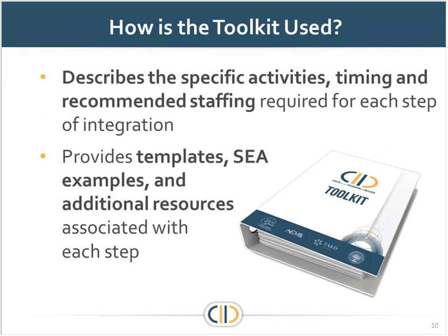So how is the toolkit used? Number one, we create specific activities within each major component, which we'll go through briefly as examples for how to complete a major step or a task within the step related to data integration, as well as providing estimates on how long it may take you and your colleagues to complete this activity or task, and who may be involved, trying to provide as much information up front as possible so you and your colleagues know what you're getting yourselves into.